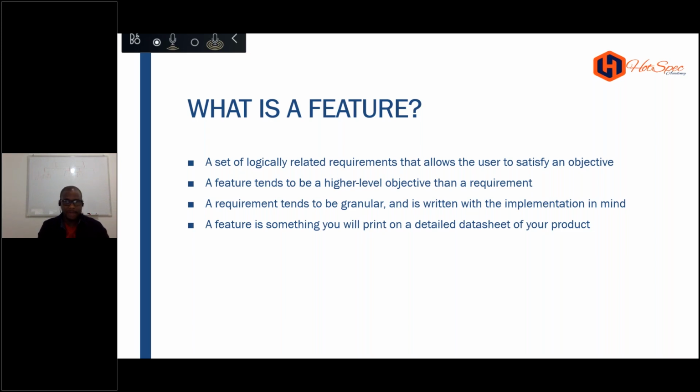Nothing more. For a PM, we now take that to define a project, then break the project into phases and tasks, assign resources to it and set a budget for each resource. Now set a baseline and get the business to agree with that budget. Keep it in a baseline and start managing, monitoring, and controlling it. That's not all of the responsibility. Every week they need to write a report. They have to keep on top of the game, chasing people to make sure they're doing something. Yeah, get the flow of it.